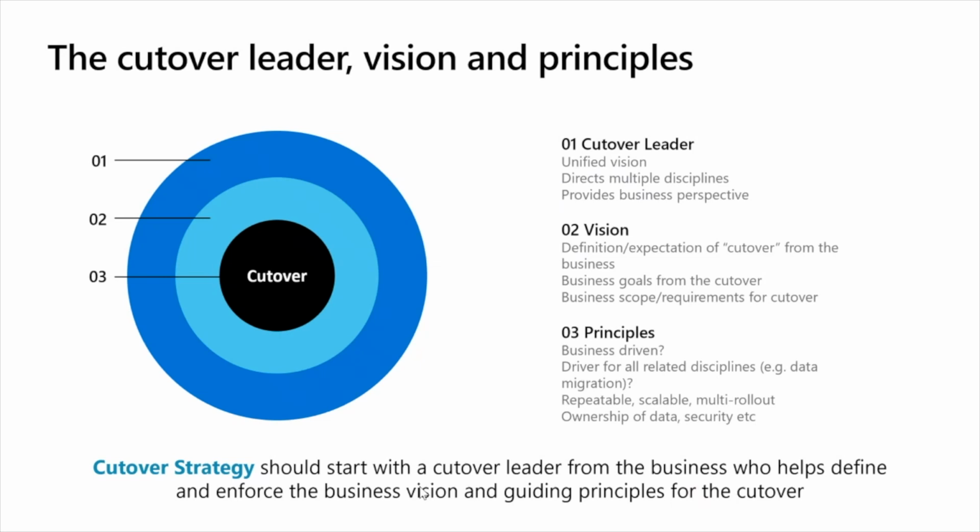And not just for the final cutover, but also for the interim periods, for when you need data for testing, for training, etc. There are multiple parties involved in that as well. And having a cutover leader that you nominate from the business helps you unify that vision. It helps you have somebody who is now the liaison with the business as well. And having that single cutover leader then allows you to also provide a business perspective to the cutover and not just a technical data migration perspective.